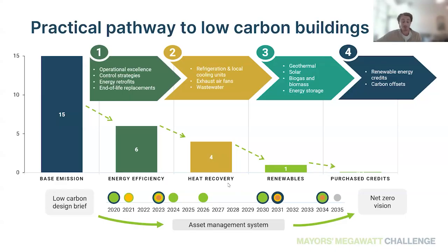In our studies, we look at the incremental difference between what we call business as usual and low carbon. To operate a building, it's going to cost money regardless. These aren't Wall Street investment funds where you're going to turn a huge profit all of the time. Sometimes just heating a lobby isn't going to turn you a profit. But what we can see is, okay, an air source heat pump costs a bit more upfront, but over the 30 years, with reduced utility costs, carbon tax is a conversation. But with all of these various potential savings, which option ends up having the lowest cost of ownership throughout the 30-year or whatever your study period is?